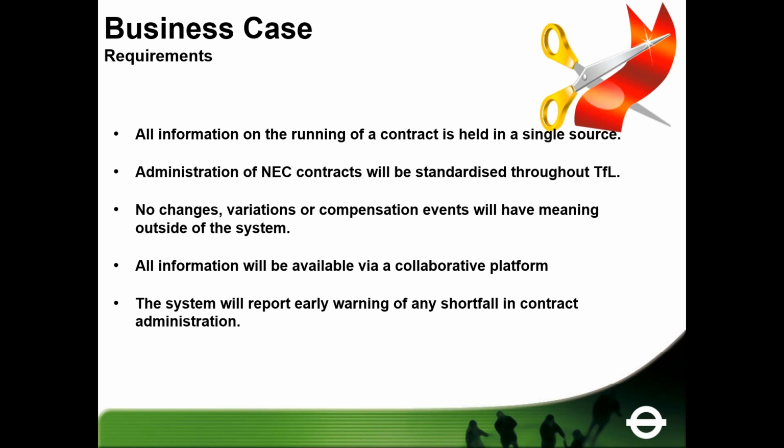So the business case was having a requirement to have all of their contracts and their information held in a single source. We found that teams were working different ways. Some were capturing variations and early warnings through Excel sheets. Some were just simply emailing those early warning notices and variations and conversation events and instructions. All of that information was being exchanged in different ways, and there was no central space, no central location to hold all of that information,